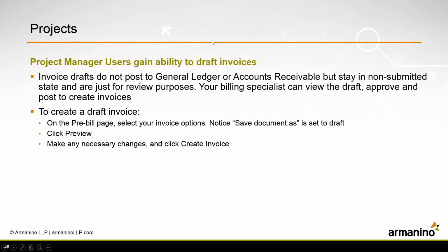Intacct's also continuing to add additional capability to the project manager user, and one of the things it's given in this release is the ability for the project manager to draft invoices. The key benefit of using draft invoices is that they do not post to the general ledger or to the accounts receivable, and they simply stay in a non-submitted state that can be subsequently reviewed.